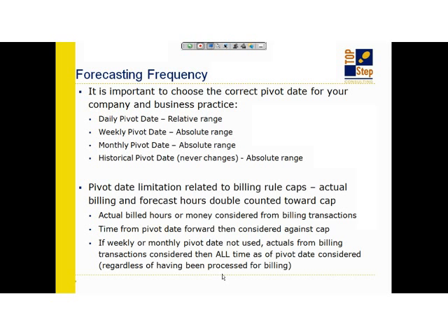It's because since you don't have a date that's ignoring actuals to some extent, it takes what you've already billed, okay, so the 10 hours that you've already worked, okay. Then it looks at the same time in the system and says, oh, here's 10 hours that you worked in October. Let me add that to my cap total, so that's 20 hours now. So you already processed 10 hours. Then it goes back and looks at that timesheet again and says, oh, there's 10 hours, so 20. So that means you only have 5 left to work after that thing. It actually counts the billed hours twice, okay.